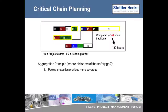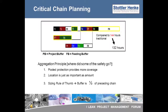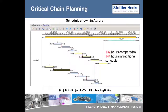The location of the protection is just as important as the amount. Buffers of protection are strategically located in the project plan, with a large project buffer at the end of the project. Here is the Gantt chart representation of the critical chain network. Critical chain elements are in yellow and buffers are elliptical in shape.